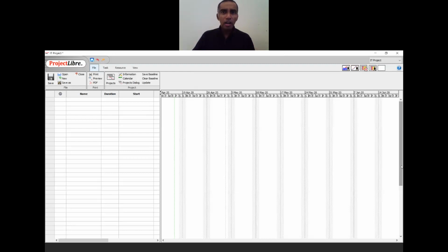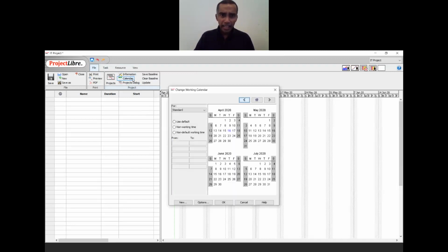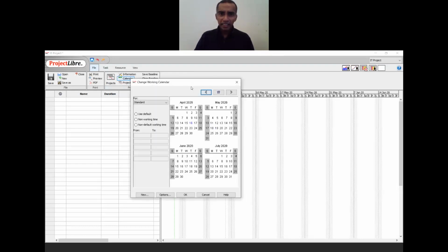Now let me show you how to set up a public holiday, right? From your screen here, you can see under File the word Calendar. You click this button called Calendar, and that will pop out your calendar screen. From the calendar screen, you can choose the date of the holidays, then you can register them as a non-working day.